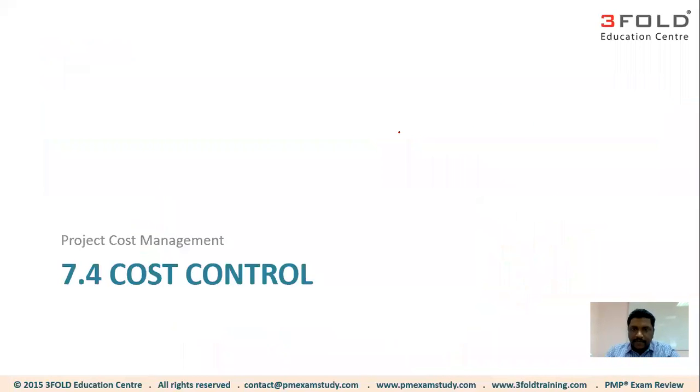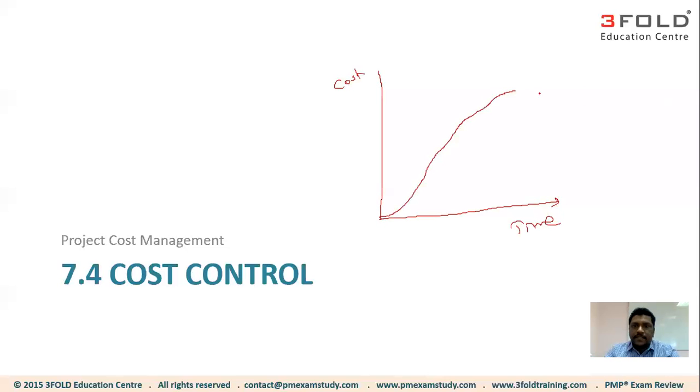Is the S curve, isn't it? We do have the S curve or cost baseline, where we got the time on one side and the cost on the other side. And let's assume this is our S curve. All right, and this particular point here is where, as per your plan, your expenditure should stop.